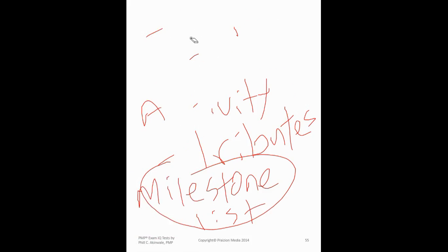Remember I said it starts from Create WBS, even though in between Create WBS and Define Activities, you've got Plan Schedule Management that you need to get out of the way first. But really, it all starts from Create WBS, having your work breakdown structure like this, for example. Remember, we already took a look at this on a previous day.